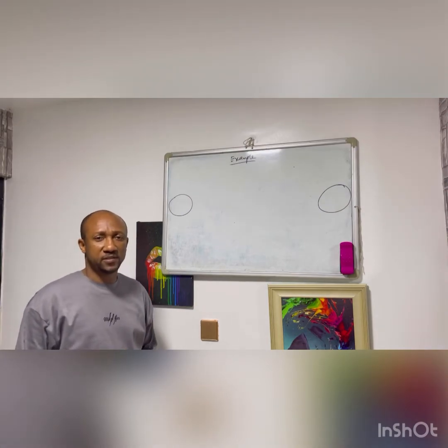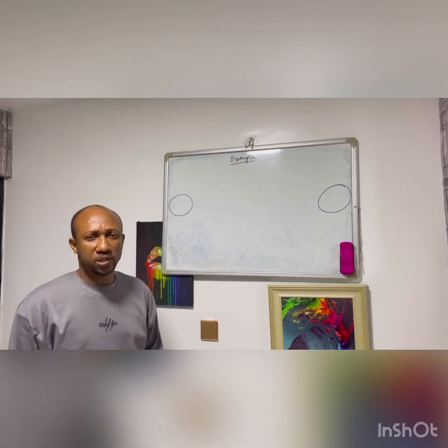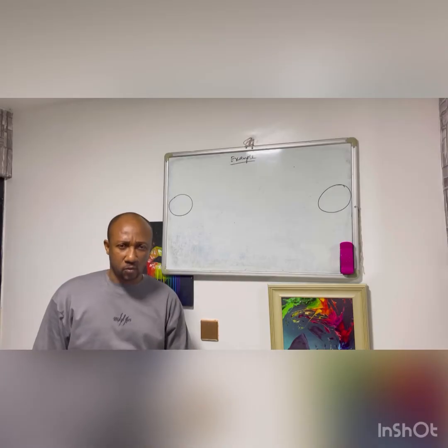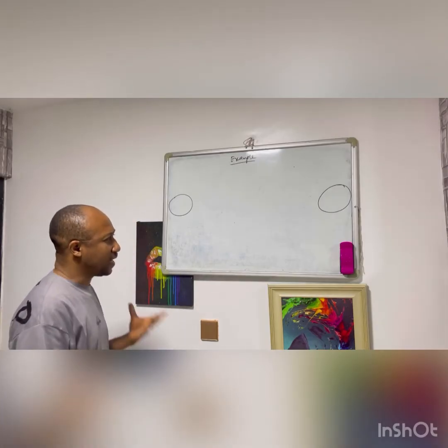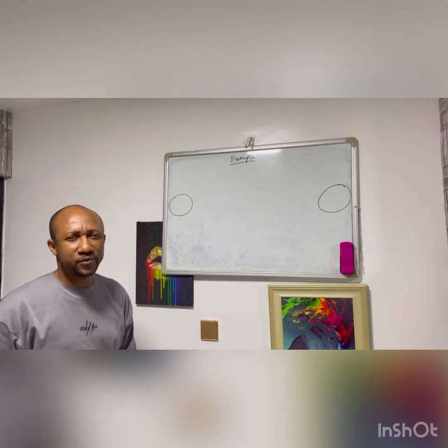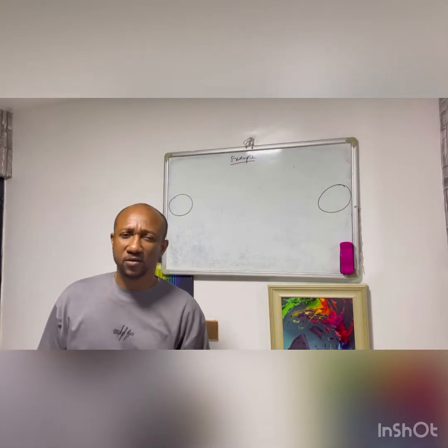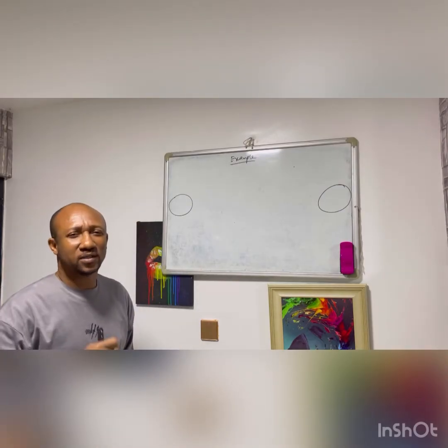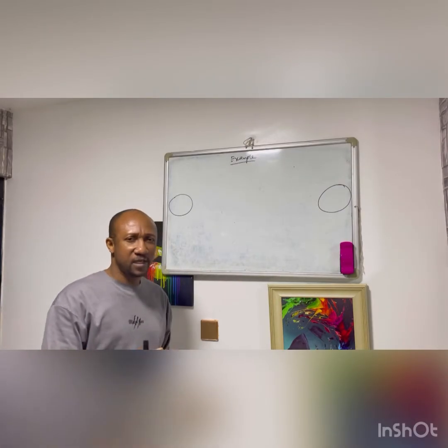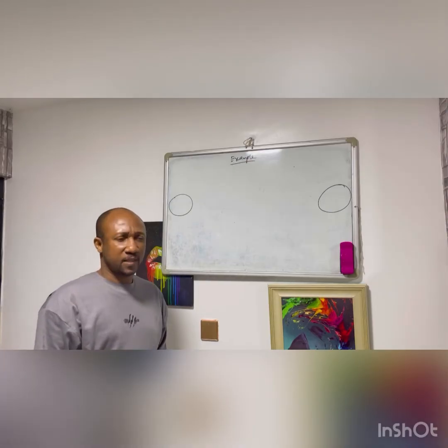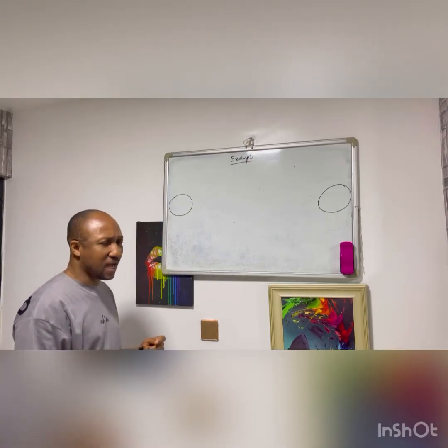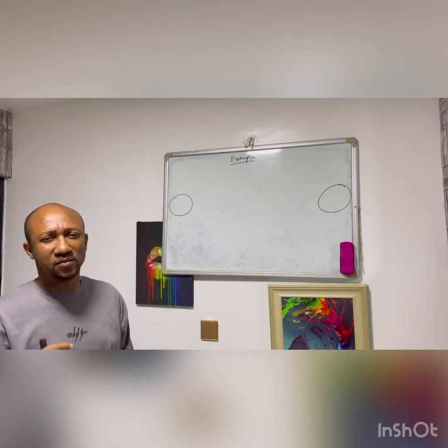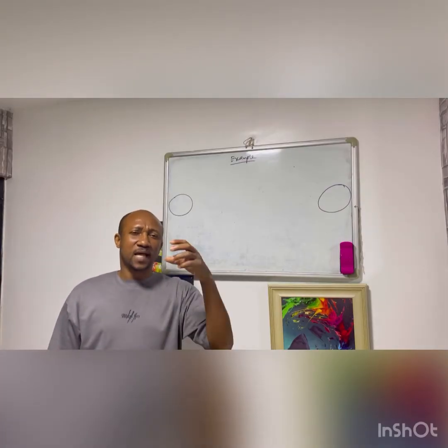But before I draw activity A, I need to know the origin of activity A and where activity A will conclude. In the example, I see that activity A does not have a preceding activity, because in the column of the preceding activity, what I find opposite activity A is a dash. Having seen that, it simply implies that activity A will start from this origin.